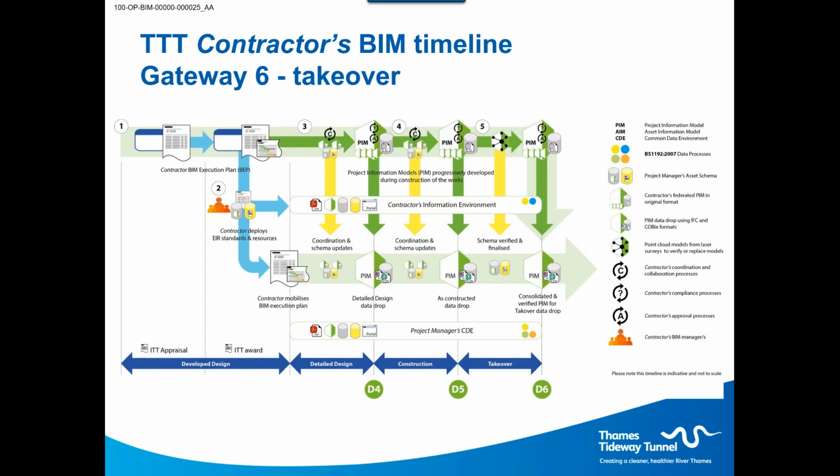And it's very interesting, especially that example, because I come across that a lot in design-build. My wall design changed. Well, wait a minute, we've already poured the footing. You can't change the wall because the footing's already in the ground. So now I'm stuck with the wall. And the ripple effect of that is amazing.